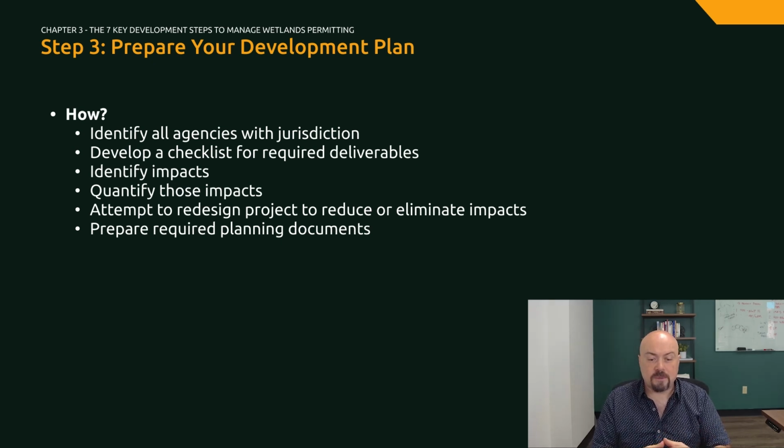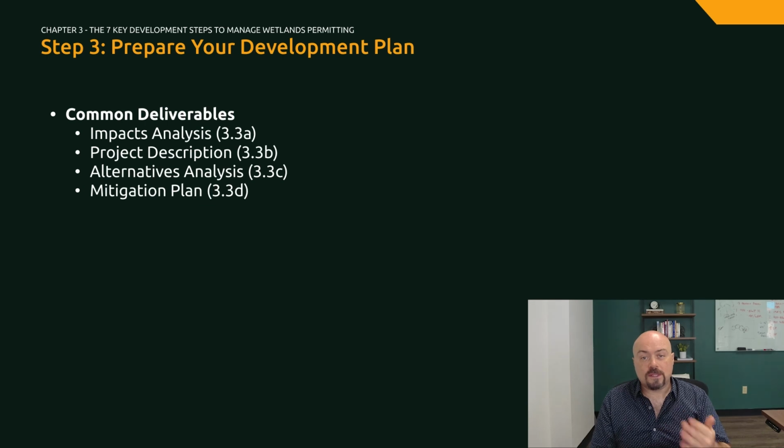Similar to a building inspector requiring you to remove improvements in a building that have not been permitted, state and federal agencies will do the same thing if they see grading or improvements in areas that have not been permitted through their own laws. Once you have finalized your impact areas and determined the project is worth the cost, you